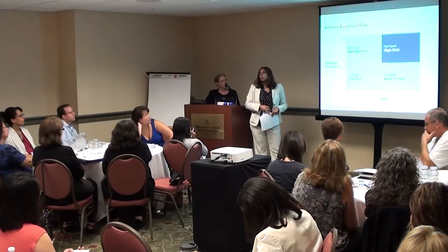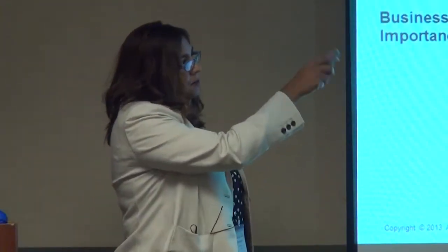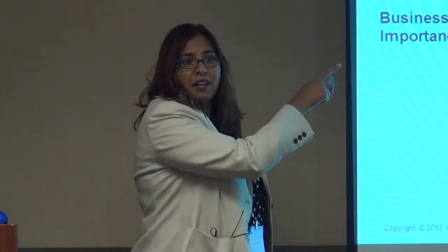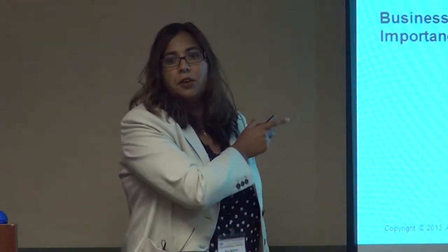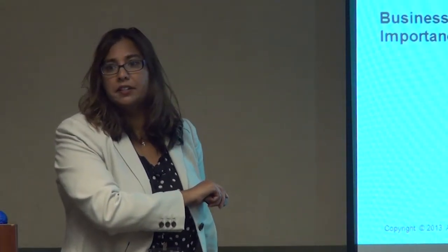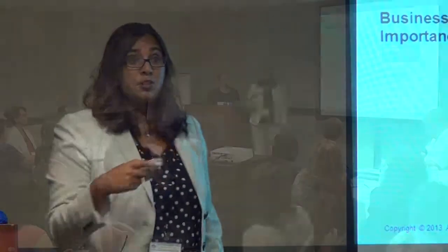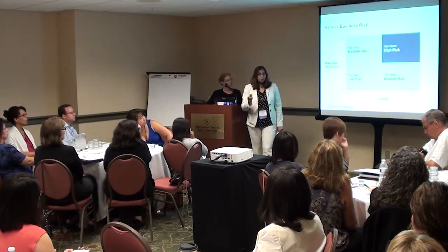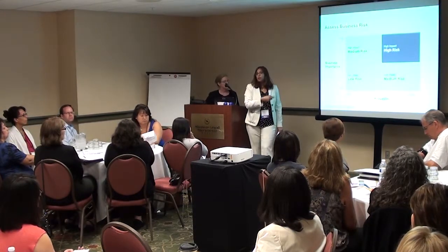And then by assigning a score to that, you can then create a scatter diagram, if you will, across these 4 quadrants or 2 by 2, and really figure out, all right, what are my risks that are high impact to my business and high likelihood of occurring, versus something that might be a low impact and a low likelihood of occurring. You still have to pay attention to these. And by the way, as the project moves forward and internal and external factors change, because we live in a moving world with different things changing both internal and external to the program, we have to revisit our risk assessment.